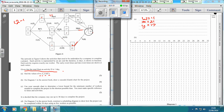And Z: when is the latest that Z can start? Z could start at 12 and this one be done for 22. But if this one starts at 12, that's not going to be done - if it takes 5 days - by 9 days. So therefore this one is going to need to be 4, so that activity F is done by 9 days. So Z equals 4.